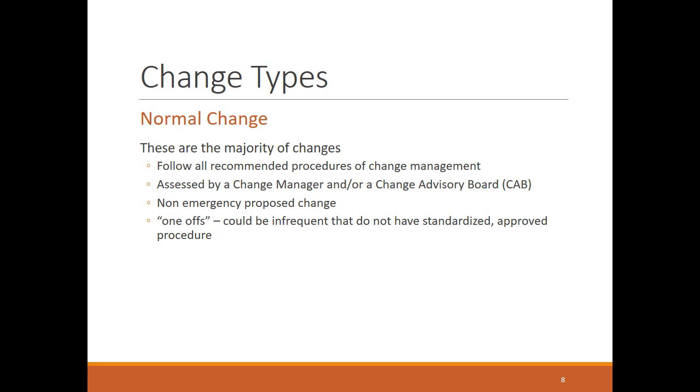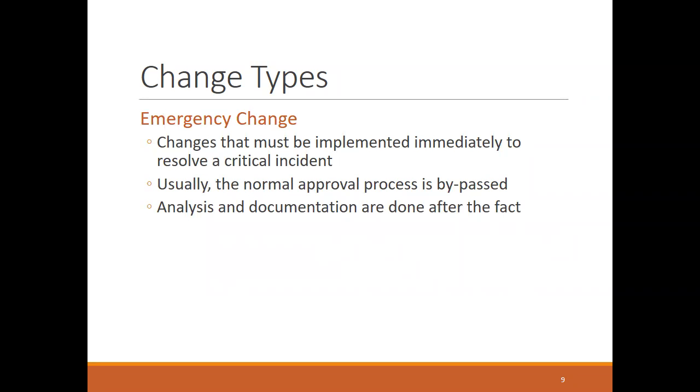That's a normal change. As opposed to that, with your emergency change, you have a very high priority because of urgency and because of importance. Urgency means it needs to happen now. It's a case of we need to restore our system. So we go and do the thing and restore the system. Then afterwards, we pick up the things where they lie. Afterwards we do the paperwork.